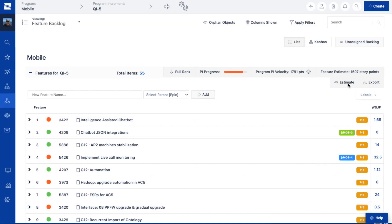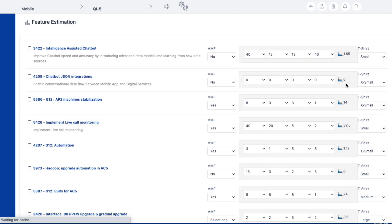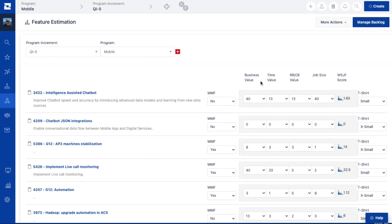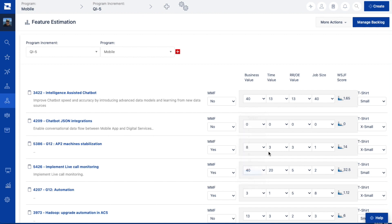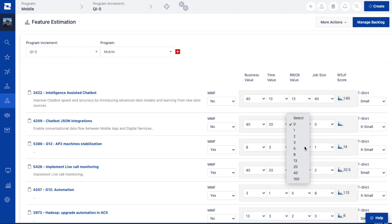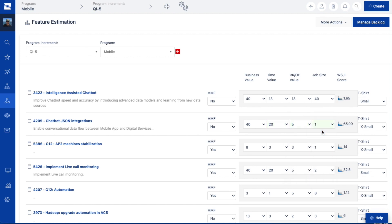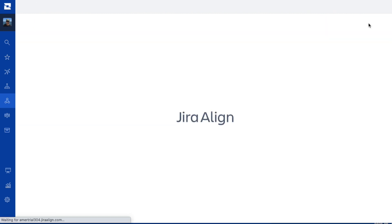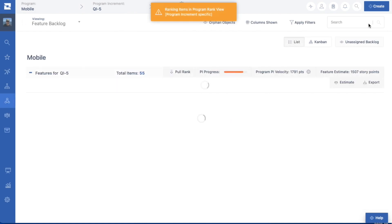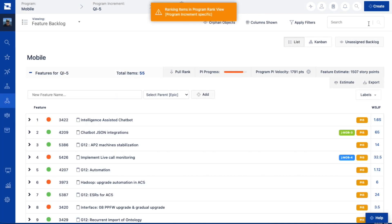In Jira Align, you'll have the ability to set the priority of the backlog using several different techniques, like weighted shortest job first, also known as WSJF. You can set a WSJF score for epics and features that consists of a relative rating of business value, time criticality, risk reduction, and or opportunity enablement, and the overall size.